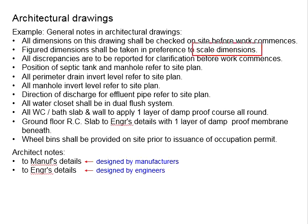Next: all discrepancies are to be reported for clarifications before work commences. Discrepancies refer to contradictions or illogical information given in the architectural drawing where you suspect there are errors. You need to seek clarifications from the architect before work starts. You cannot simply assume certain things, as this can lead to implications such as increased construction costs or project delays. The architect requires you to check the drawing carefully before constructing the building.